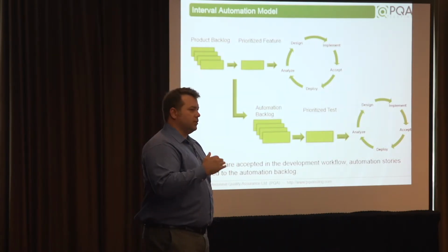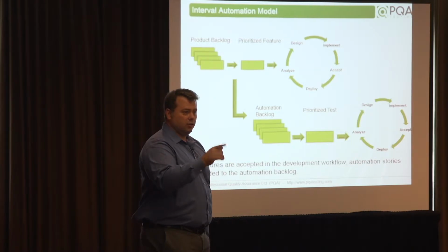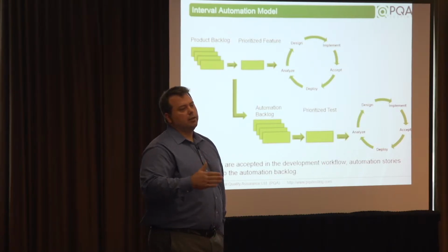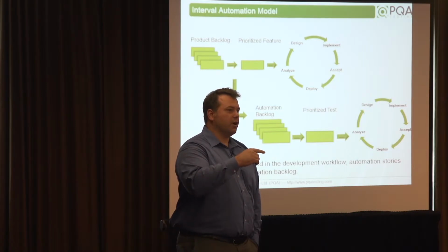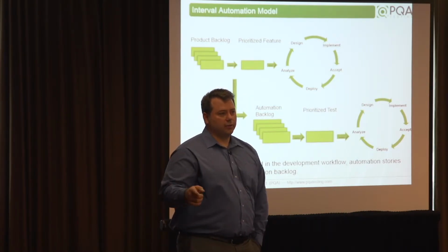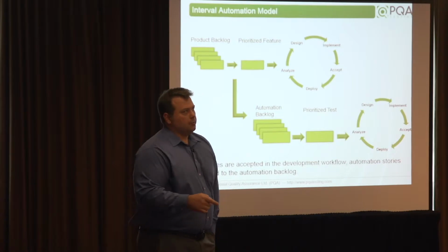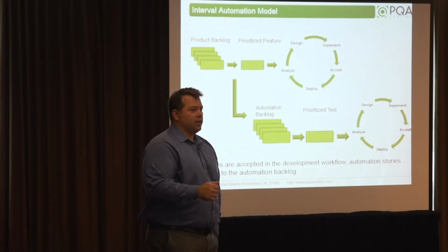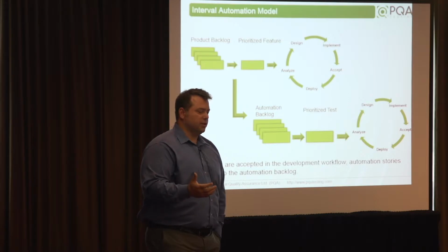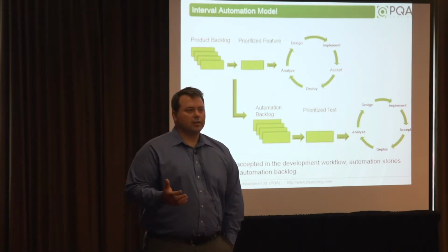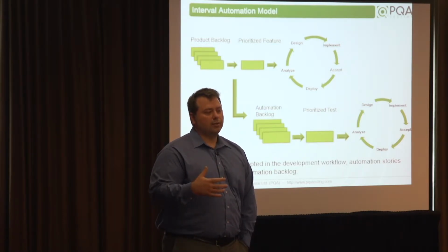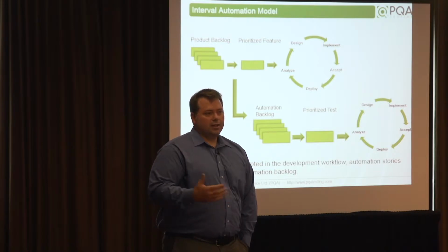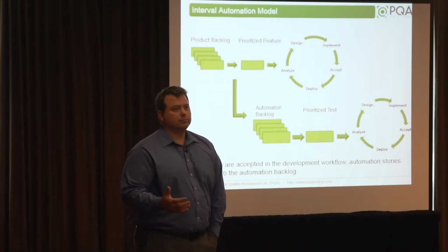What I'm talking about is basically a second team, but you could use the same team depending on when in your Agile cycle development traditionally delivers. You could have the same team working on the prior sprint's automation while they're waiting for new features to be delivered. On your first question, reaction to failure, it's going to change depending on the organization, but depending on your product manager and how he feels about the automation, how necessary he feels it is, that story might get accepted anyway.